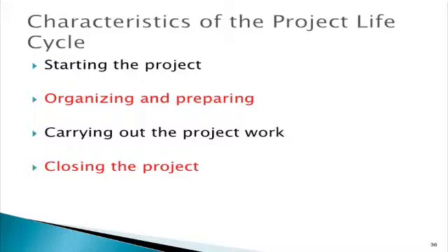Characteristics of the project life cycle. Projects are very different in terms of size, scope, and complexity, but most projects go through 4 generic life cycle structures. These include the following: starting the project, organizing and preparing, carrying out the project work, and closing the project.